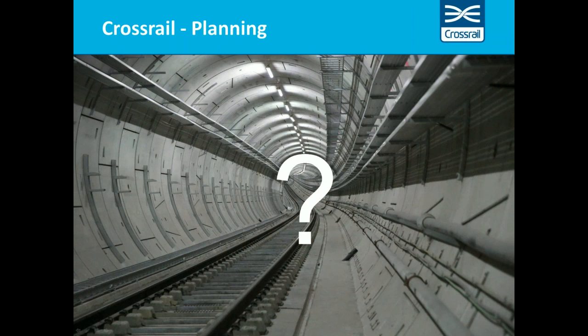So I would say detailed planning, in my opinion, is 12 to 18 months out. So the next 12 to 18 months in detail. Beyond that, it's got to be much higher level, broad brush. But planning in detail, I think you need a certain level of detail to make sure that, for example, when we were doing our tunnel enlargement at Bond Street or Tottenham Court Road, where we're mining stations, we have a clear understanding of the rate that we are expecting to hit in terms of our mining program. We need to know what that is.